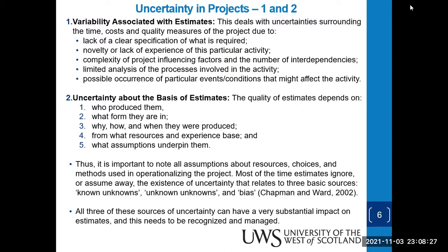What about the basis of the estimate? So they normally depend on who produced these estimates. Is the person qualified? What form are they in? Are they just some typical narratives or quantitatives or a blend of both? Okay. And why, how, and when were they produced? Were they produced specifically for this project, or they copied it from a similar project and gave it to us? And from which resources and experience base were they collated? And what assumptions underpin these estimates that are being given to you?